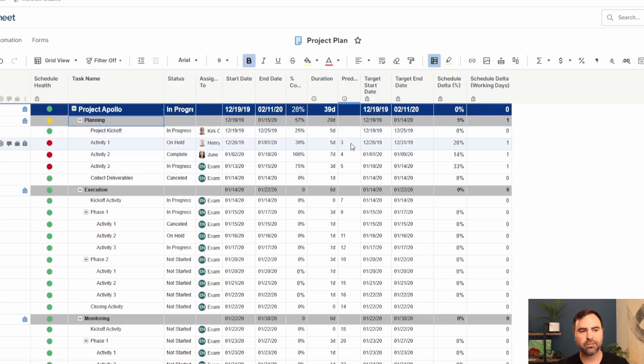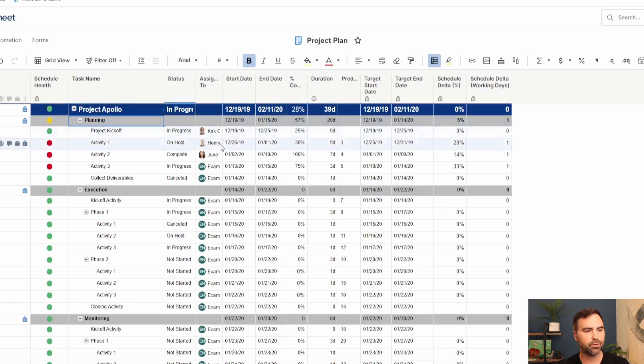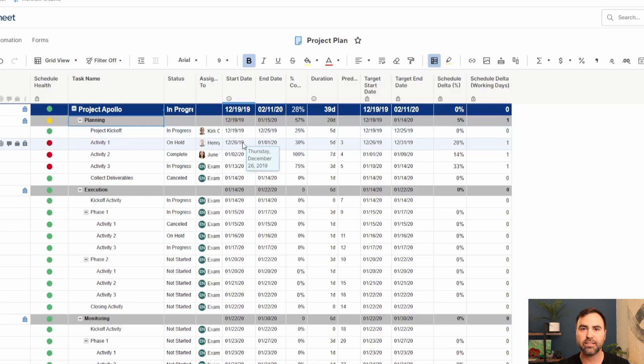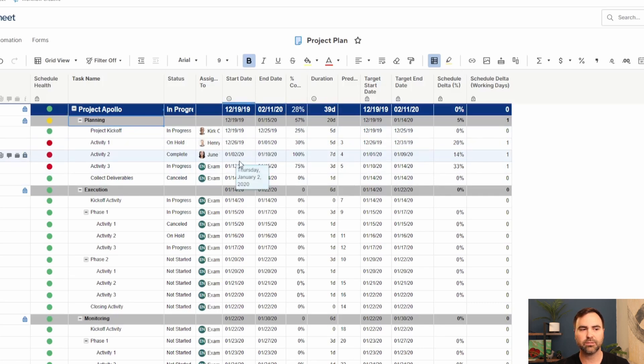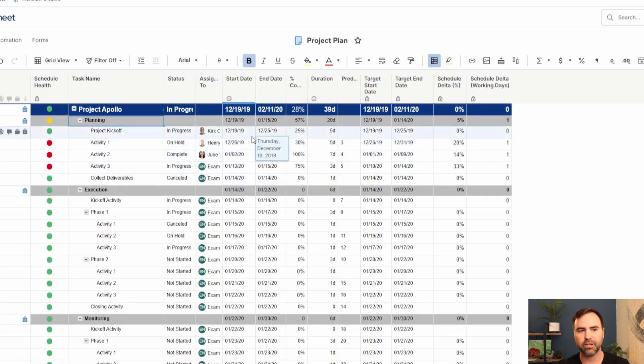For our predecessors, for instance, this row says that when row number three ends, then this row can begin. The start date should start. So we can use predecessors to define our dates within our tasks based off of other tasks within our project.